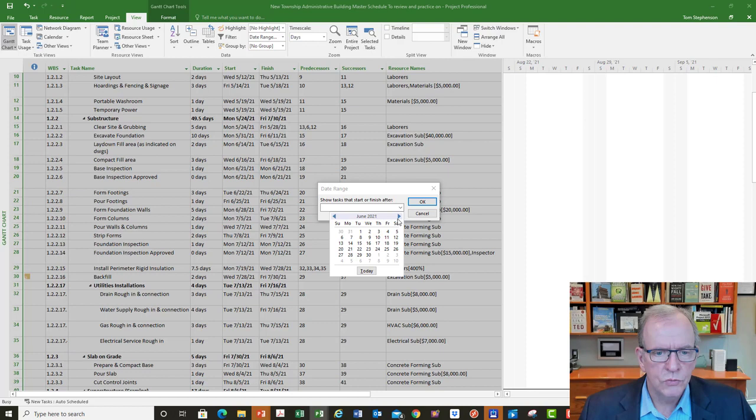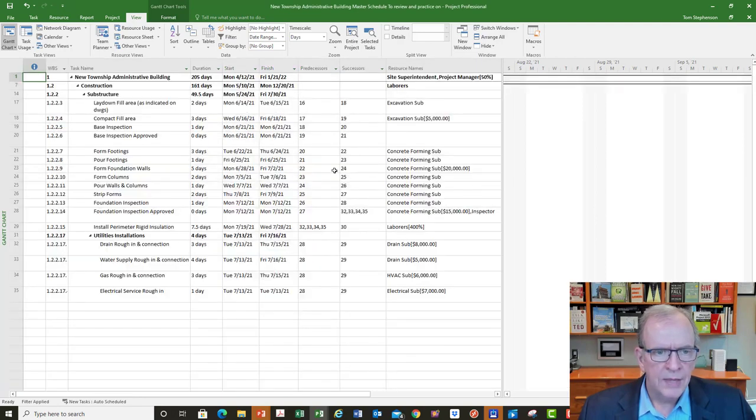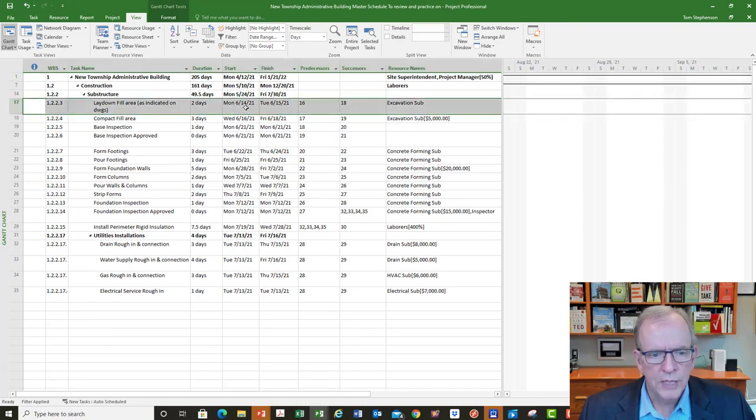So let's go to June 16th, 2021. Actually, let's make it the 14th. From the 14th, right? And click OK. And then I want to go to June. I want to go actually 14th, I want to count out 1, 2, 3 weeks, 4, 5, 6 weeks. So at the end of 6 weeks, I'm going to click OK. And that's just going to show me activities that start from June 14th that go out 6 weeks.